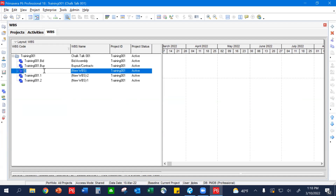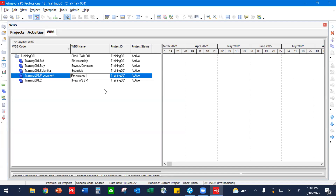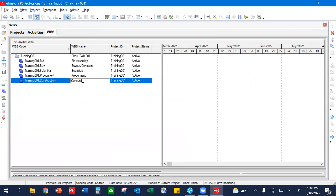It's going to be a generic flow — you'll always have a bid process, you'll always have your buyout process. We'll go ahead and create a couple more here, and as you can see they'll just keep in tree format. So you just want to make sure any time you create, you're going to take those WBS's and make sure they all fall in that main project. From here we'll go Submittals, then Changes, then Procurement. You can make these any names you want — there's no standard to that; it's how it fits your project. Design-build projects may have a totally different layout than your typical lump-sum or hard-bid projects. The last step here we'll call Construction.